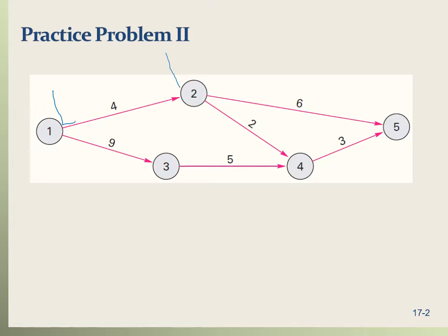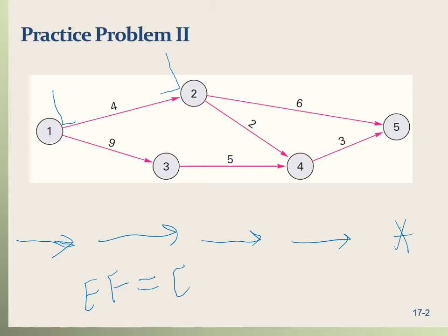Let's actually draw this box here. So for activity 1 to 2, let's find the earliest start, early finish. So we compute the earliest start, early finish beginning from the earliest point, the start point, which is node 1, and we go through a forward pass up to when we get to the last point, and we compute the early start and early finish. The early finish formula, after identifying the earliest start, is earliest start plus t, and t is the time that it takes to complete an activity.